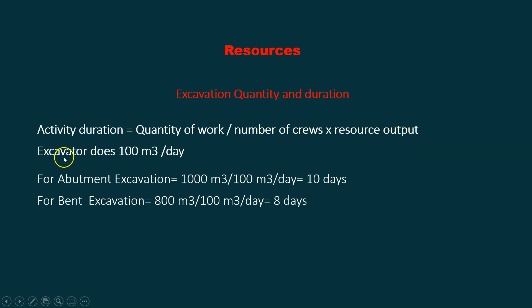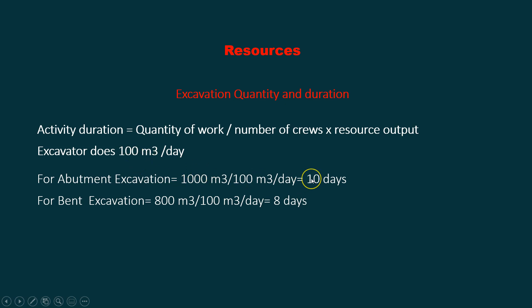If you have two excavators that can do 200 cubic meters per day, the abutment excavation equals 1000 divided by 200, giving you five days.